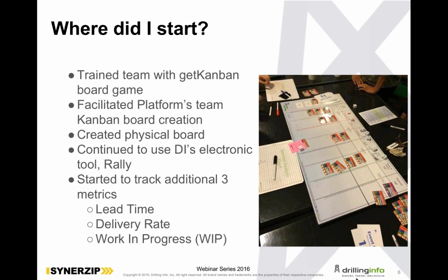And then the other half is waiting to be done. If you have to wait a week, then you have to pay the penalty of, okay, where was I? How has the code base changed now? Did we actually do something to cause defects in this feature now? So I like to bundle stories up. If the team decides to break a feature down into 10 different stories, and you can say, well, 3 of them make sense to go together as one story, then I would pull in all 3 of those stories, track it as one work item, and then pull it all the way through the system until it was done and released. That's the approach that I would take. That makes sense. All right.